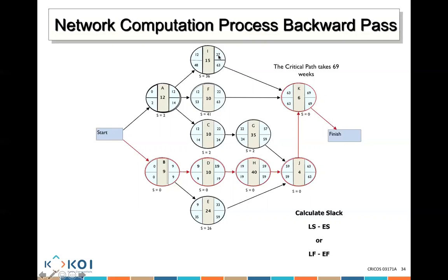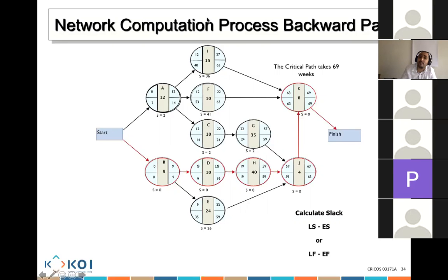If I delay this activity from day 27, is that going to affect my next activity start time if I delay it by 10 days? No, because I have a slack of 36 days. Does that make sense, guys? Thumbs up.